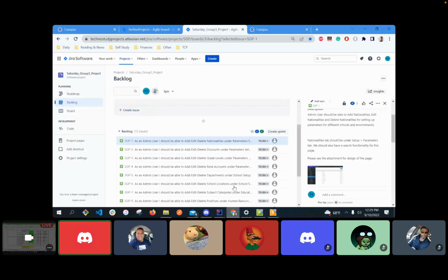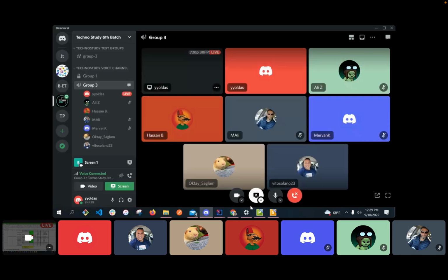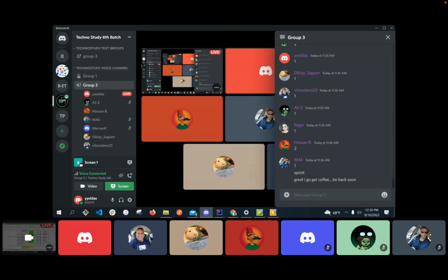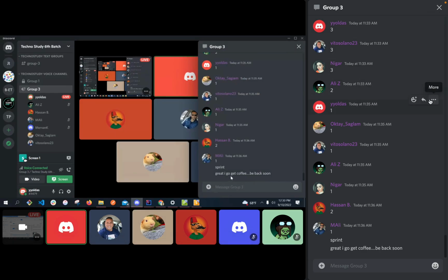So I just want to say, before we move to the user stories, you know our business, our sprint is two weeks. Let's see our team capacity first, right? Does it make sense? Okay. So everyone, if you already know your availability, please send it to me on the chat, and Oktay can write it down and we can calculate our team capacity. So send me your availabilities in one sprint, please.